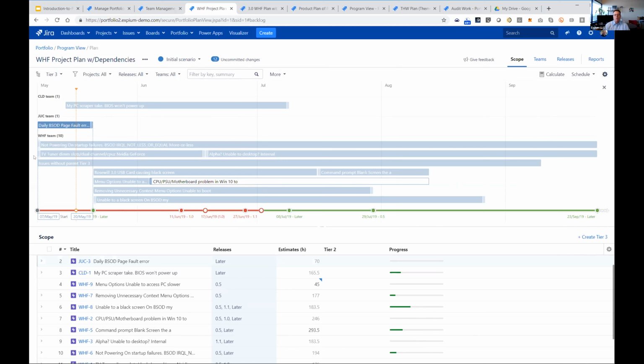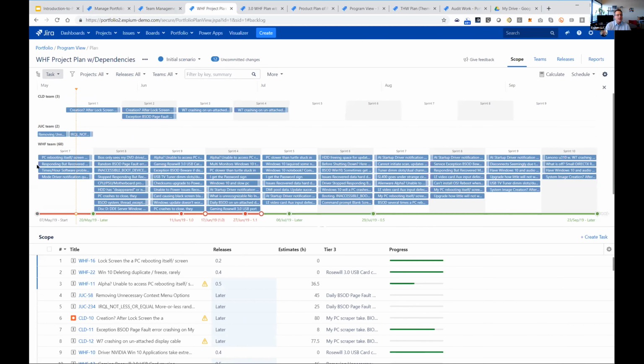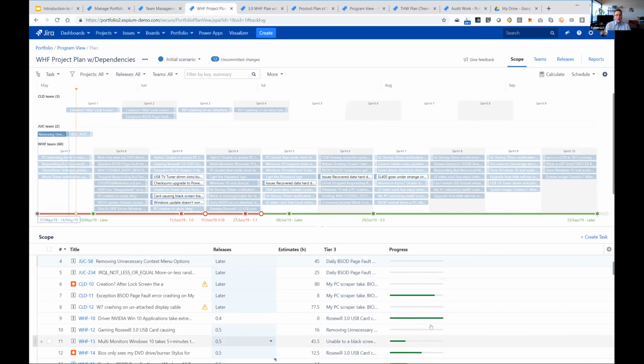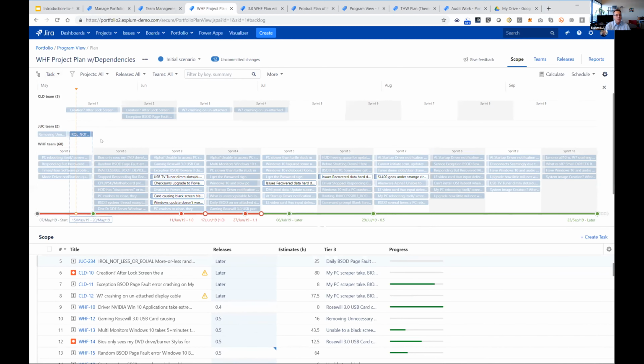So the ability to surface and visualize threats to the schedule that are outside of your team is really important, and something that we build into our engagements. Now, if I go down a level, I can begin to see the critical path through my work. So I might not only see items that are outside, I can see the overall impact. The critical path through all these issues is coming through this item from this external team. And it turns out they're dependent upon this item as well.